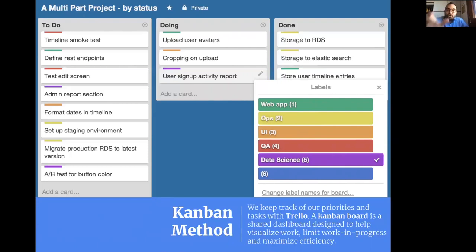You can add a 4th list between doing and done, which is review, and that's where the team leader can vet the quality of the outputs being produced by the team. But that's optional. This kind of dashboard is called a Kanban dashboard or Kanban method. There is a lot of literature online. You just Google that name and you can find loads and loads of interesting documents.